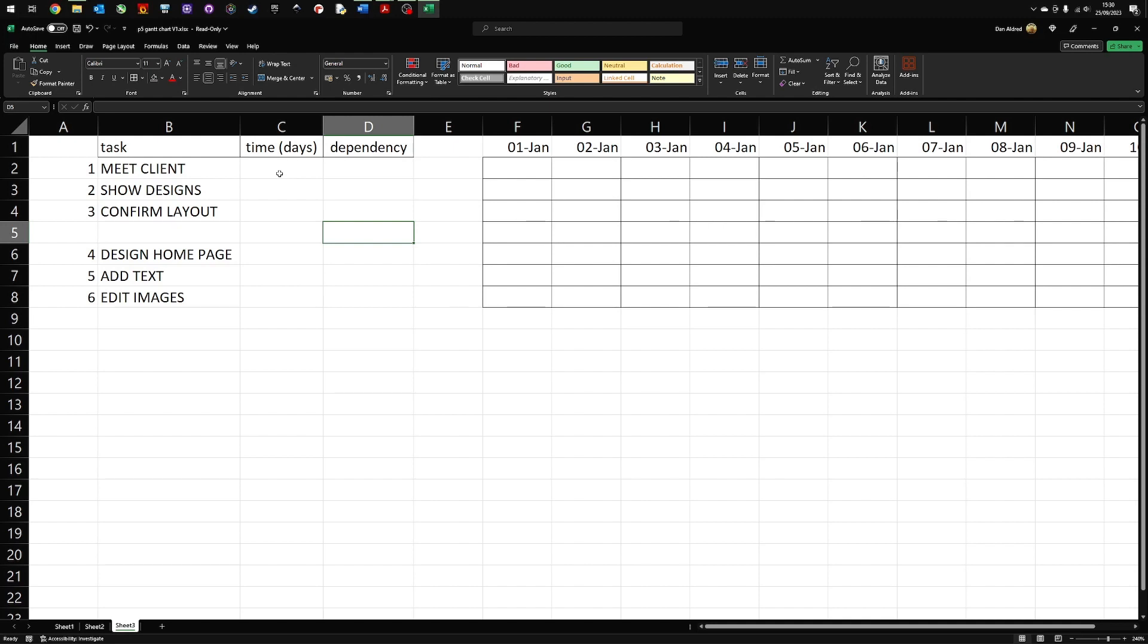So what happens is you first of all list all the tasks that you need to complete in order to finish this project. You're probably looking somewhere between maybe 60, 80 or 100 tasks, depending on what you are creating. Try and break the tasks into smaller and smaller tasks. And this will allow you to create a long list of tasks.